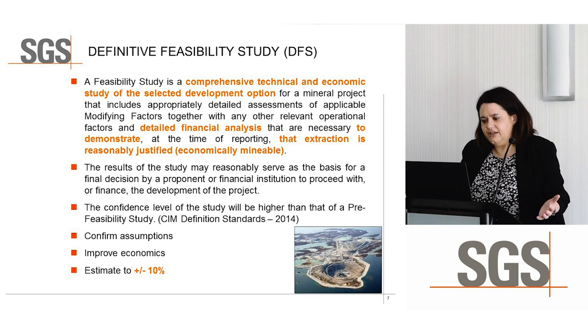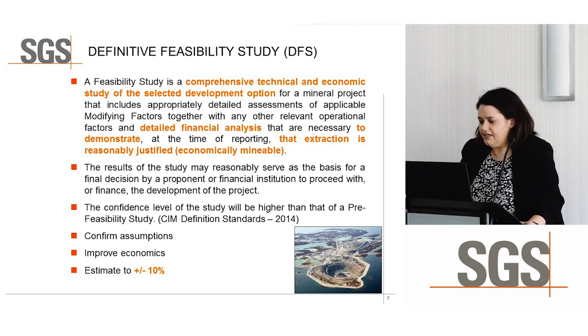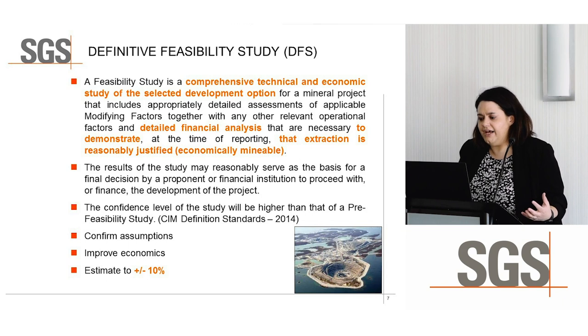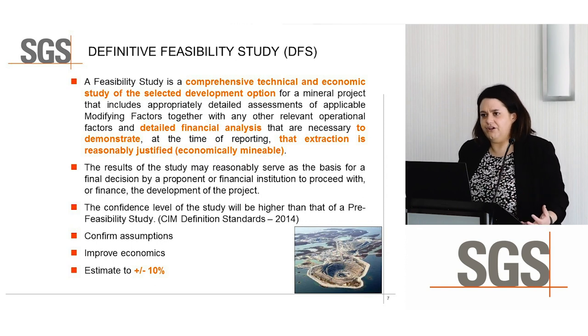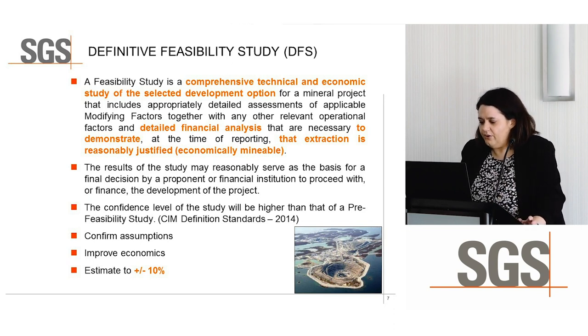And then you get onto the DFS, or the definitive feasibility study, where you're looking at the comprehensive technical and economic study of the selected development options. So at this point, you've got your flow sheet, you understand what's going on, but now you're tweaking it and refining it. So basically, the results of this study will reasonably serve as the basis for the final decision by a proponent or a financial institution to proceed with or finance the development of a project.